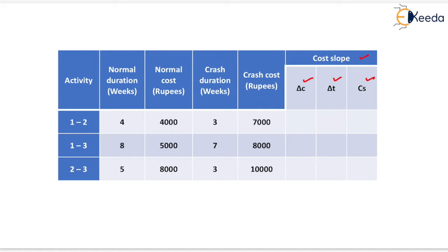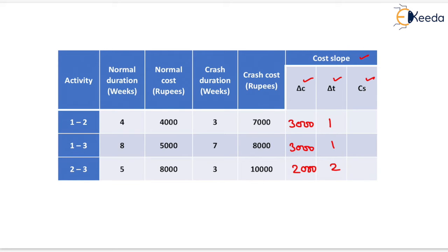Delta C equals crash cost minus normal cost. So 7000 minus 4000 equals 3000; 8000 minus 5000 equals 3000; and 10000 minus 8000 equals 2000. Delta T is determined by subtracting crash duration from normal duration: 4 minus 3 equals 1, 8 minus 7 equals 1, and 5 minus 3 equals 2. Cost slope is delta C divided by delta T, giving 3000, 3000, and 1000 respectively.